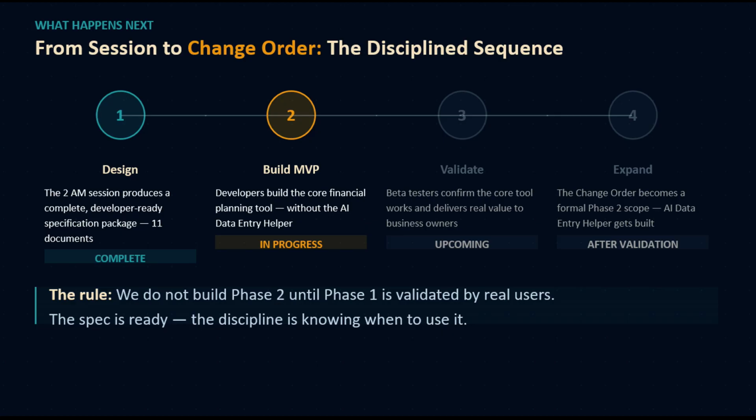And this is the life cycle that we want to go through. And then we would probably have some form of beta testing or end user testing to validate this. And I probably will do it before I release an MVP. I'll try to get some beta testers into the sandbox well before the MVP, because I don't know if I have it right or not. We have to have some form of what I call IV&V, independent validation and verification. IV&V is a major toll gate control in the life cycle of a project.